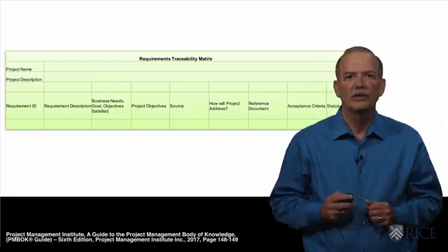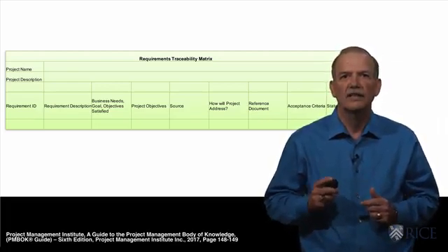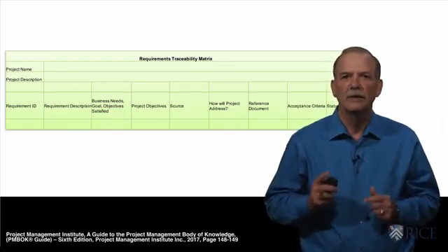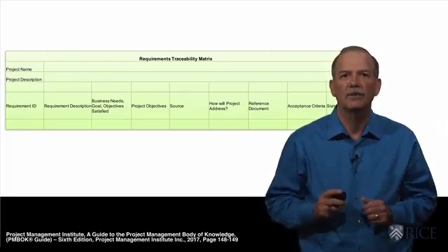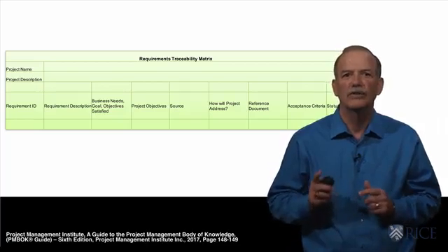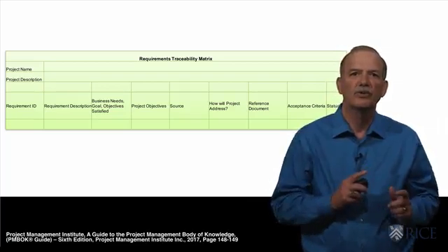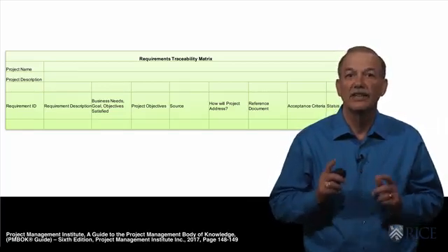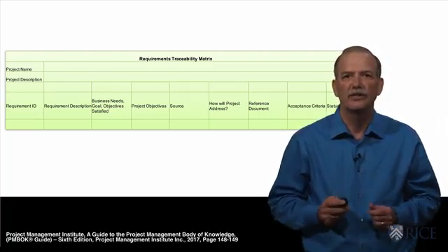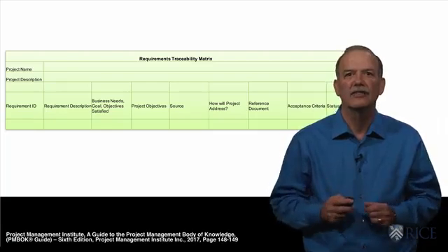As we review all of the project's requirements with the project sponsors and prepare time and cost estimates, some of the requirements may be modified or even dropped. The traceability matrix is a great place to capture the disposition of any requirement that is modified or dropped, including the source of the authority to make these changes. The beauty of this approach is that when a stakeholder approaches you at the end of the project and asks why you didn't include a feature or service in the project, you can go back to the requirements traceability matrix to find the answer.